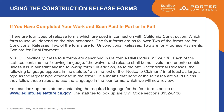The forms are described in California Civil Code sections 8132 to 8138. You could Google California Civil Code 8132 and find these. Each of the statutes about these four releases contains the following language: 'The waiver and release shall be null, void and unenforceable unless it is in substantially the following form.' This means the language in these statutes has to be followed pretty much verbatim in your releases.